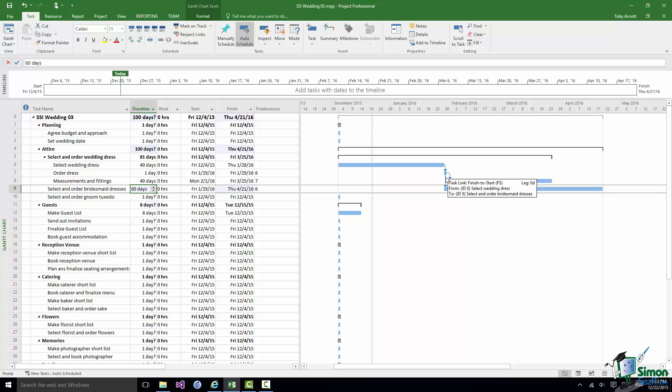It's an FS, a Finish to Start Dependency. That means that the first task in the dependency, that is Select Wedding Dress, must F, Must Finish, before Select and Order Bridesmaid Dresses can ask and start.